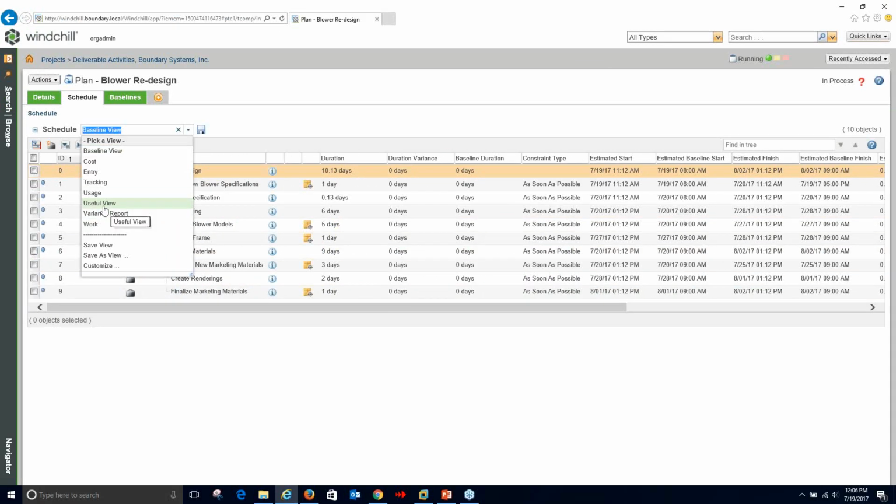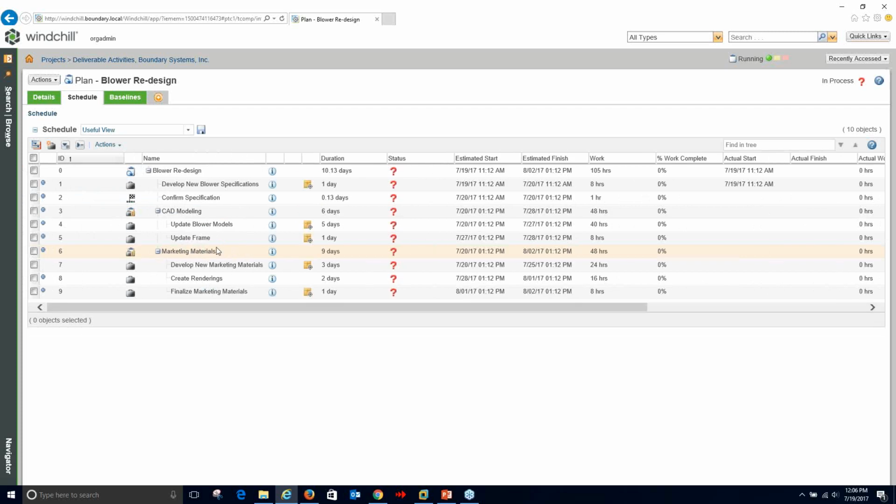So go back to my non-baseline view here. So I can see this activity, it actually has started. I started the plan, so it started that activity, and it should go to my user in my other window over there. And it's estimated for 8 hours of work. So it's starting today at the time that it actually started. It's going to finish tomorrow at the same time.